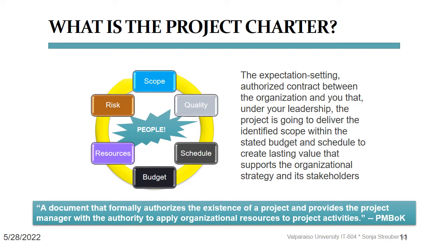Now, the PMBOK defines the project charter as a document that formally authorizes the existence of a project and provides the project manager with the authority to apply organizational resources to project activities. In other words, no project charter, no project. No project charter, no project manager. This is very important to know because I have seen in many organizations a project manager leading a project without a project charter. This almost always leads to project failure.